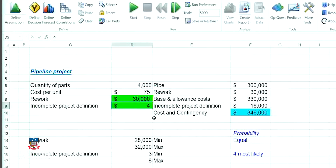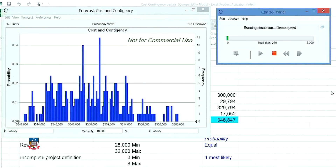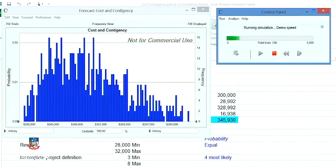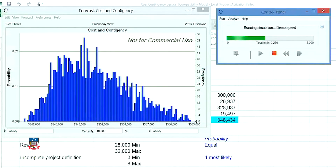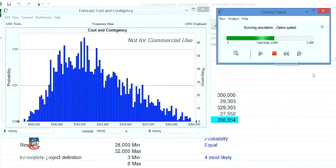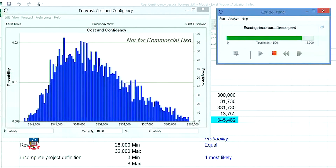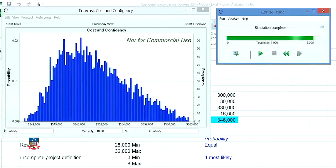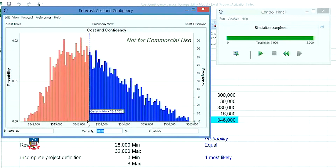Now that I have defined the assumptions, I am ready to run the 5,000 what-ifs simultaneously. You can see that I have specified 5,000 trials, so when I hit the start button, we can observe what happens. Now that the 5,000 trials have been completed, I can move along the distribution curve to select the cost estimate with probabilities attached.